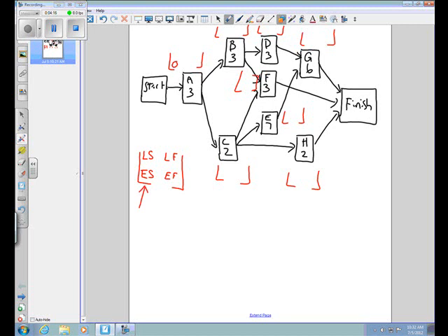So I'm going to put a 0 in the lower left-hand corner because it corresponds to the earliest start of activity A. Now I'm going to ask myself, if the earliest I can start is week 0, or now, and the activity takes 3 weeks, what is the earliest I will finish? And you should realize that that is week 3. So I'll write a 3 in the bottom right-hand corner, which indicates the earliest I can finish activity A. Okay? Now, at the point you get bored with me saying all this, that means you probably understand everything, but bear with me.